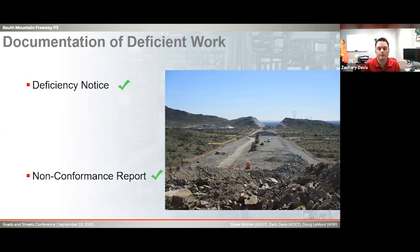Just something that you noticed on the fly. They can come, hey, you missed this, come back, come fix it. A nonconformance report was if it was a failure to fulfill a contractual requirement related to a work product, maybe it didn't match the plan, something that you'd already put in place, and it would need an engineer's buy-off to fix it later on. So that was the IQF's job, to document these and then bring them through and have everybody talk about them and move on. Next slide.